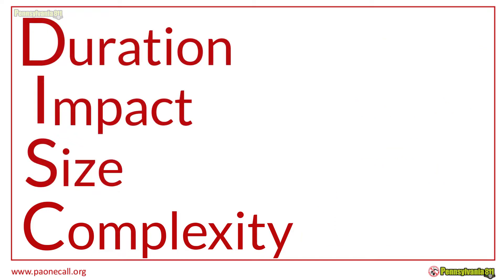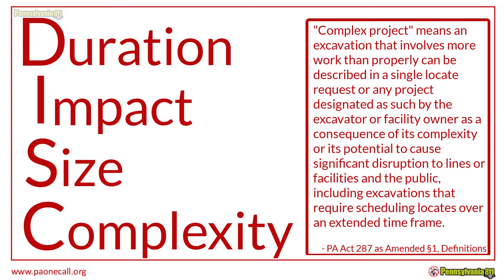Your job fits the description and should definitely be placed into CPA as a complex project. A complex project means an excavation that involves more work than can properly be described in a single locate request, or any project designated as such by the excavator or facility owner as a consequence of its complexity or its potential to cause significant disruption to lines, facilities, and the public, including excavations that require scheduling locates over an extended timeframe.